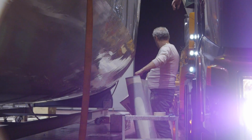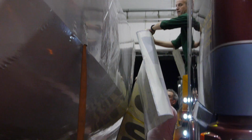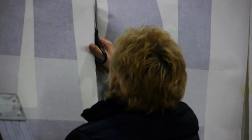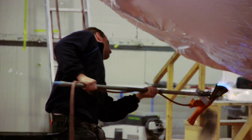So Mark, the minute it crosses the threshold there, I've got it, right? It's all yours. Yeah, we're done with it. The truck leaves at 12, but it's been all go since 7 o'clock this morning, just trying to get all the details done and wrapped up and ready for you. Why 12 o'clock? Is that symbolic? It's when the permits start. So the permit starts at 12. They can't be on the road during the day, so they roll out of here at midnight and do a lot of the driving overnight.